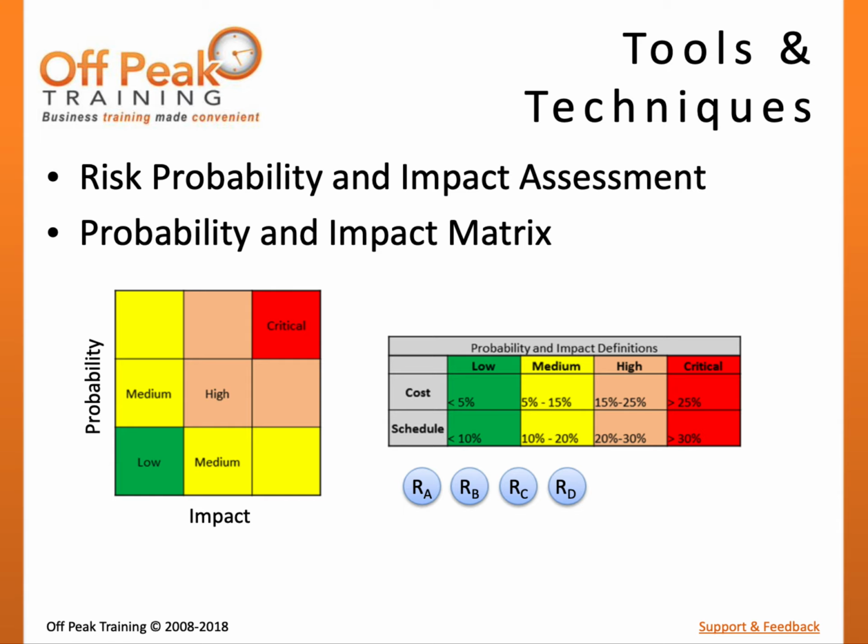The parameters for the probability and impact matrix should be provided in the risk management plan, or it could also be included in a template. Based on the complexity of the project, the matrix can include a simple or more elaborate set of impact categories, color banding, and may separate opportunities and threats or combine them into one matrix.